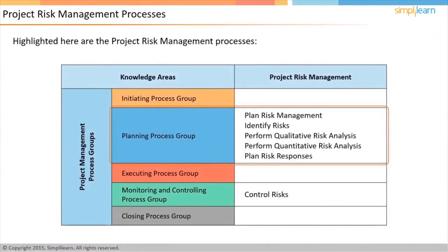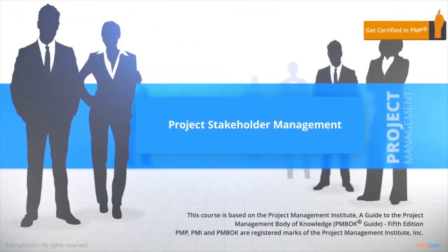Plan risk management, identify risks, perform qualitative risk analysis, perform quantitative risk analysis, and plan risk responses belong to the project planning group, and control risks belong to the monitoring and controlling process group. In this lesson, we will focus on project stakeholder management.